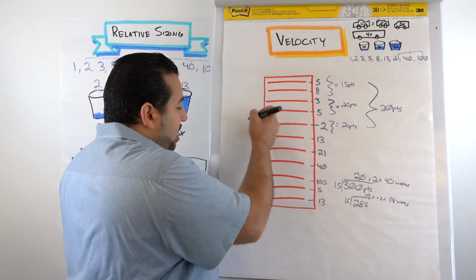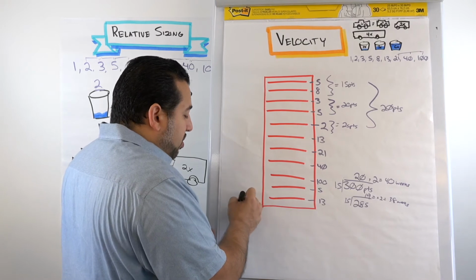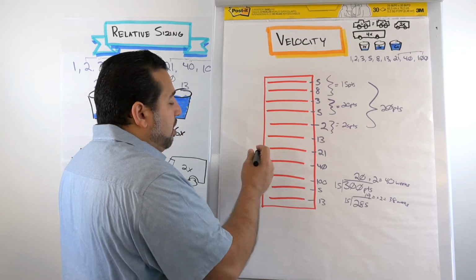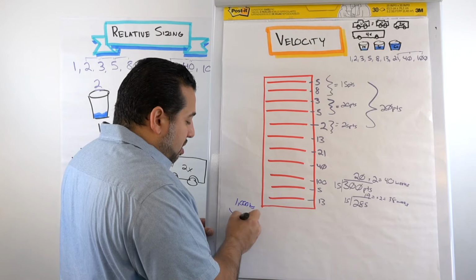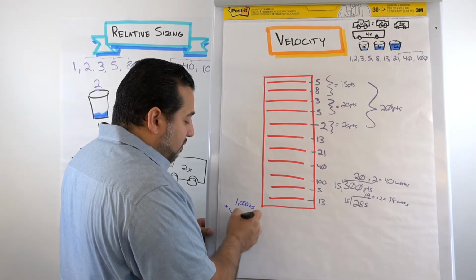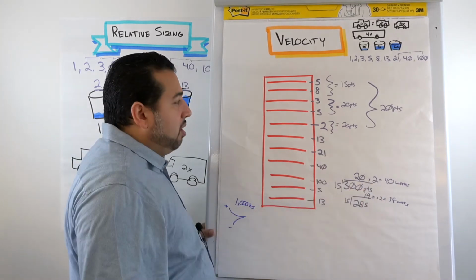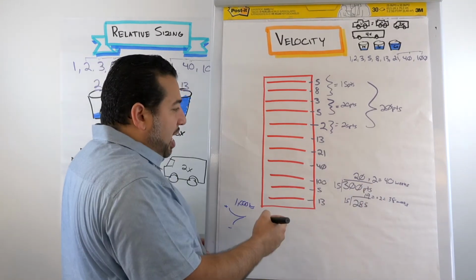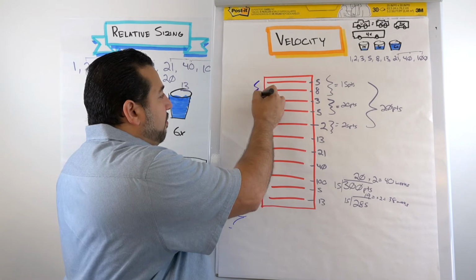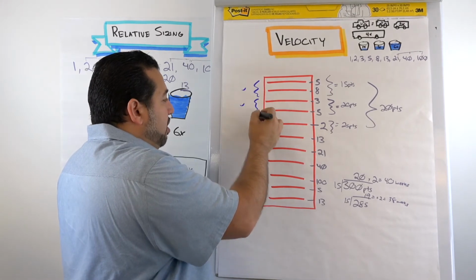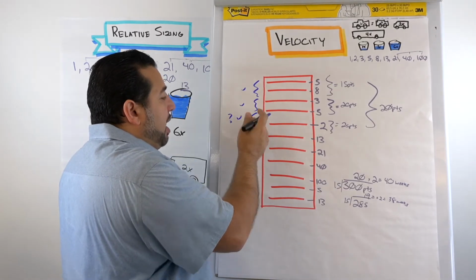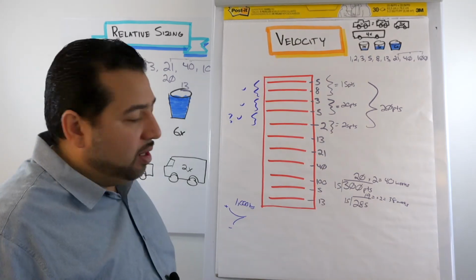But I could estimate everything based on time, and I get to 1,000 man-hours. With the cone of uncertainty, I start out with a big plus or minus scale, and eventually, as we get closer to the end of the project, our estimates get narrower and narrower. But I estimate everything here in hours. Maybe we do the first sprint, the second sprint, the third sprint, and then I ask the team how long till we get all the rest of the stuff done.